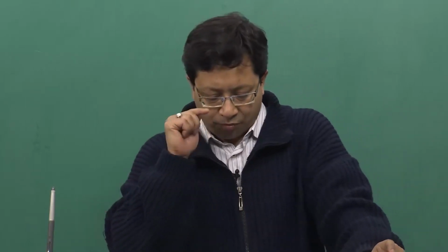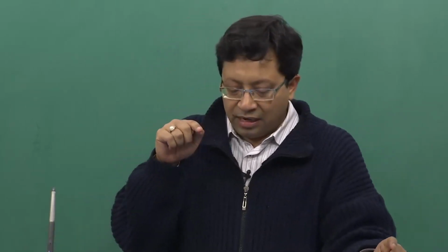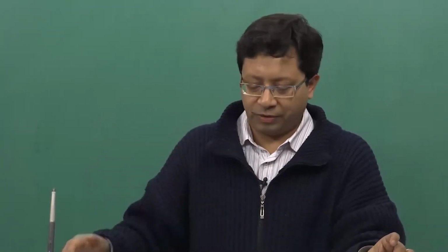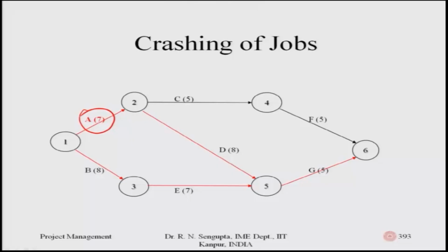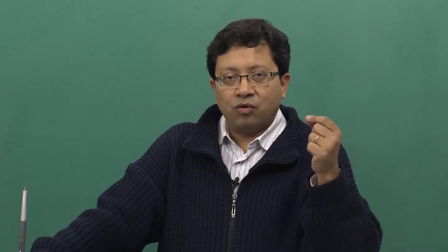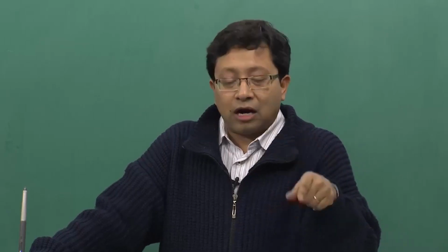So, now let us pause here for 1 minute. I will show the detailed calculation later on, but let me explain. Now, if there are two critical paths and you reduce G by 1 day, it will basically affect both the critical paths at the same time. So, if I want to find out the 1 day reduction in the critical path, which is happening from 20 to 19, what are the actual critical paths now?